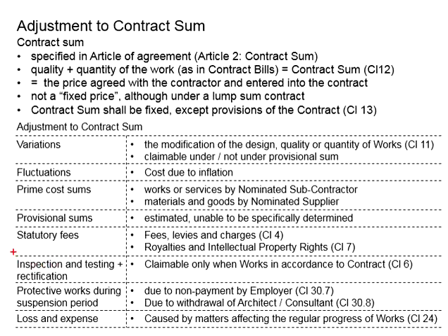So when talking about the costs to be claimed related to the inspection and testing as well as the ratifications, it will need to be proven that the contractor carried out the work in accordance with the contract, meeting the quality and the quantities of the works.